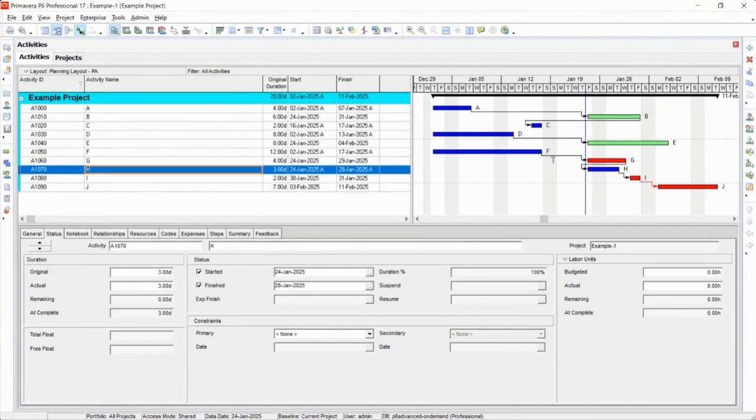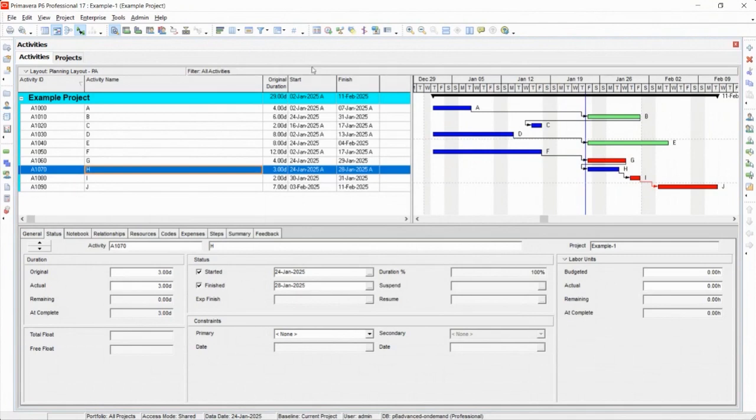Let's look at F. We skipped G, and then we did H. So the same thing is happening here. It's saying, as soon as you get back to work, you should do G. So that's why these guys get butted up against the data date line. So that's what RetainLogic does.